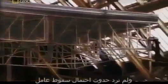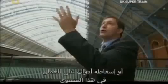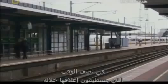There are some rails running along which had been the original rails for a cleaning gantry. And we used those and we hung a scaffold with a complete soffit to that scaffold, and that was crucial because safety was very important to us, and we didn't want the possibility of any workman either himself falling or dropping tools onto workmen at this level. Or injuring passengers. St Pancras could be renovated in half the time if they could shut it down.